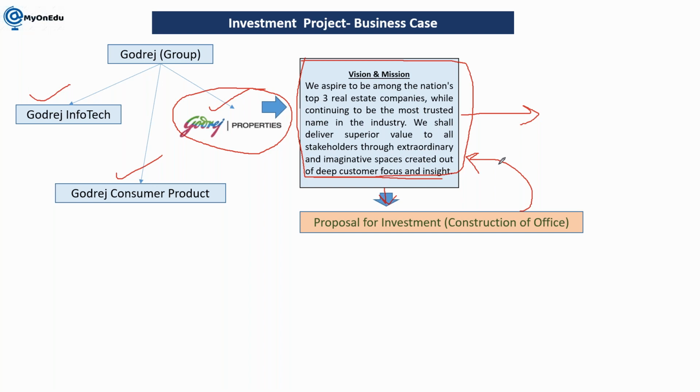So this is their strategy: if my ROI is coming less than 20%, I'll not execute that project. So whenever we are going to execute any project, we need to do the pre-investment analysis. If my ROI is coming less than that, we will reject it immediately. Otherwise, we will proceed further with initiation, planning, execution, and handover.